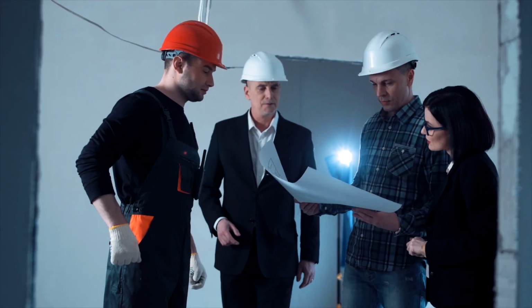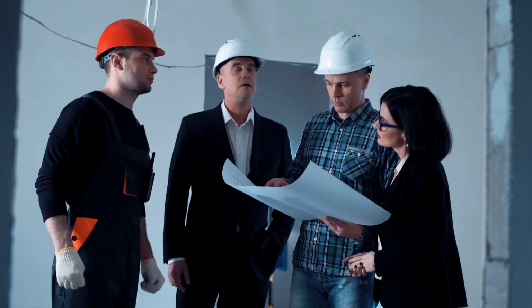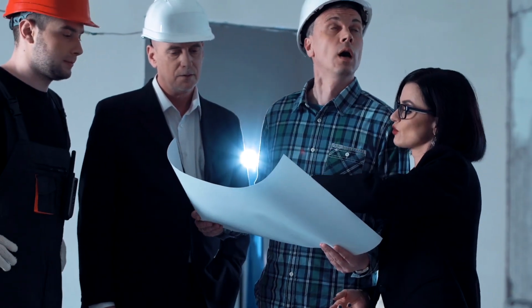If it's a very small job, you expect these things to be relatively straightforward. But if it's a big project, let's say a big house renovation, we'll typically spend £120,000 on renovating a house or converting it to a HMO, for instance. Now in those projects, we need to make sure that the builder understands exactly what we want, the finish we want, so that specification is going to be key. So this way, when the quotes come back, we can look at them and compare.